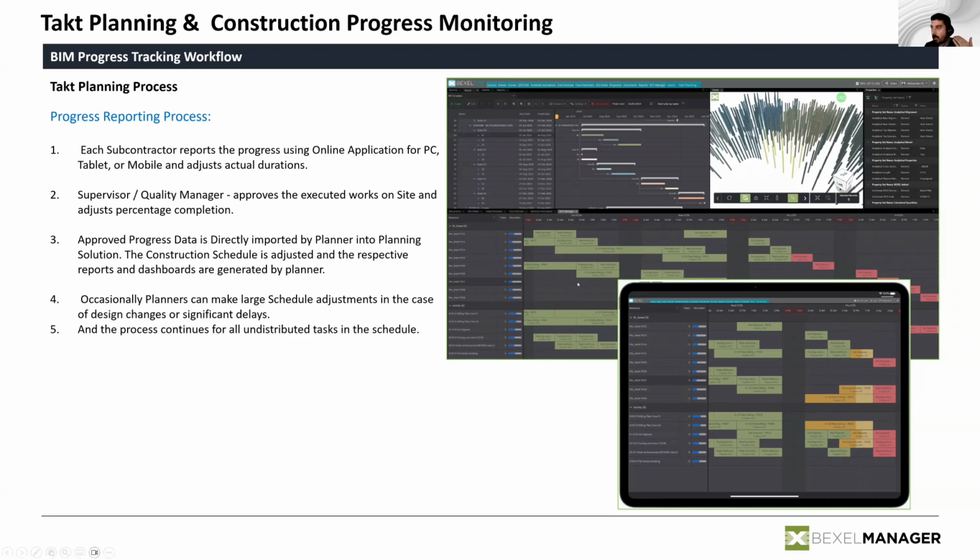On the other hand, the system is doing this. So you're reporting in your canvas, in your micro tasks, but the system is converting these reports into the progress on a master level. So if I'm an investor, I really don't want to know exactly what is the percentage of completion of drilling on the pile 10012, but I want to know the percentages. But on the other hand, if you actually have your detailed progress reporting on the micro level, then I'm going to be sure that the reports I see on a strategic level are reflecting the real data on a construction site.